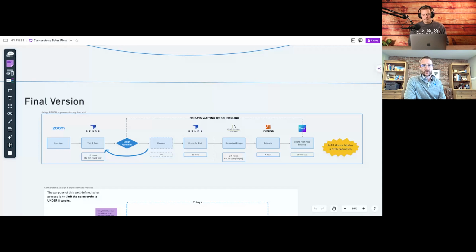There are some things that we note that we have not yet discovered, right? We'll note things, like we need to confirm what's in this wall. We need to confirm price on installing gas for these appliances, or whether or not you're going to need a meter upgrade. We'll leave notes in there like that, but for the most part, we do tell clients that you're going to be within plus or minus 10%, because we are hella good at pricing projects.